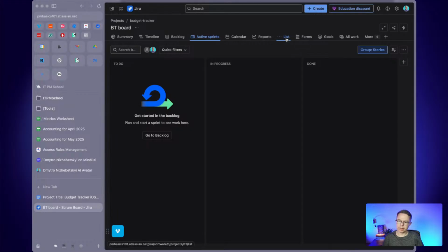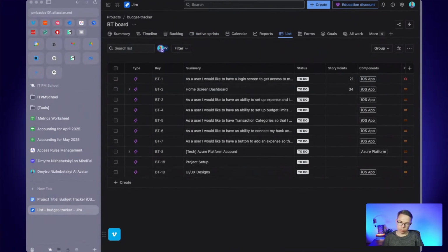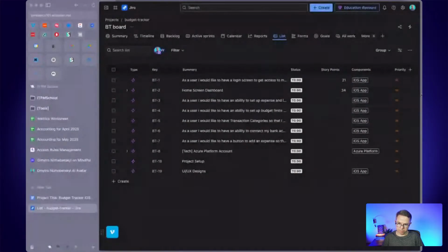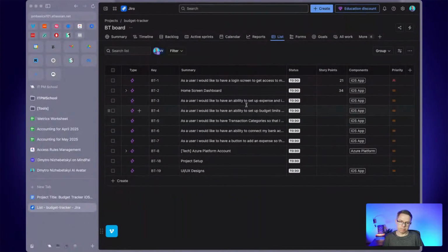you work with your epics correctly. So the biggest mistake that people make is when they create epics or similar high-level entities, they create them like a placeholder for all ideas about this feature or about this business case. And then epics just live through 10 releases, 10 sprints, and through multiple cycles.